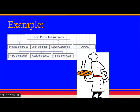Here is an example of a work breakdown structure. The whole thing is the WBS, and the lowest level of activities are called work packages. For example, 'serve pizzas to customers' might involve: provide the place, cook the food, serve the customer. Cooking the food can be further divided into more manageable work packages: make the dough, cook the sauce, build the pizza.